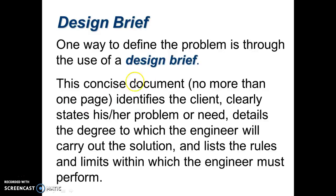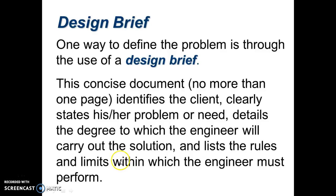One way to define the problem is through the use of a design brief. This concise document, no more than one page, identifies the client, states his or her problem or need, details the degree to which the engineer will carry out the solution, and lists the rules and limits with which the engineer must perform. Those are our criteria and constraints.